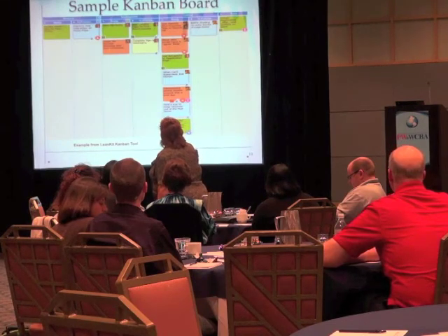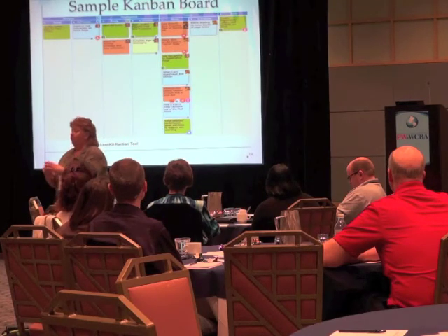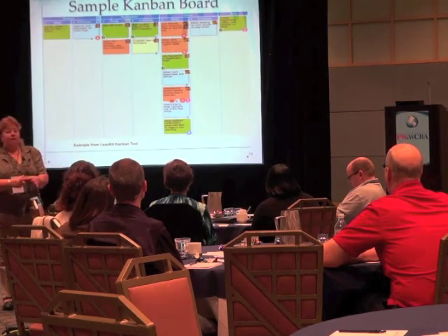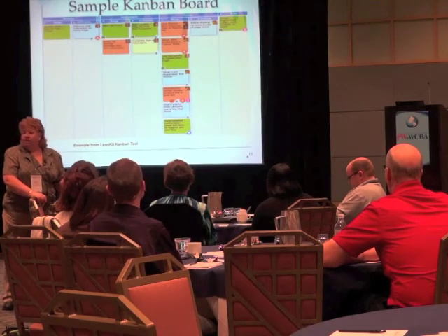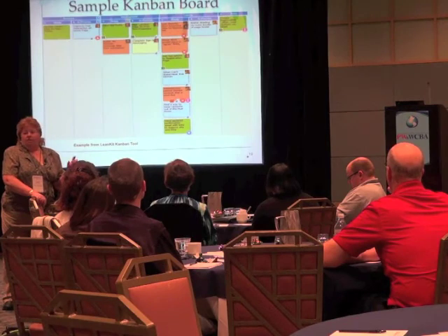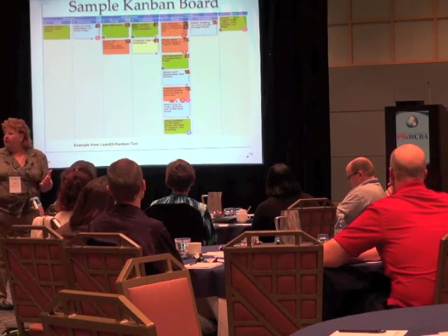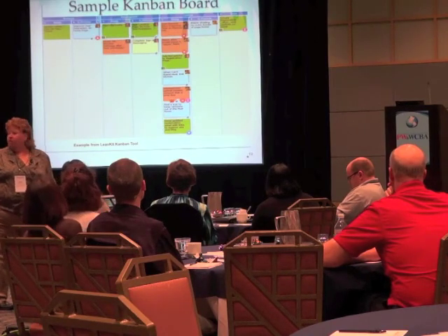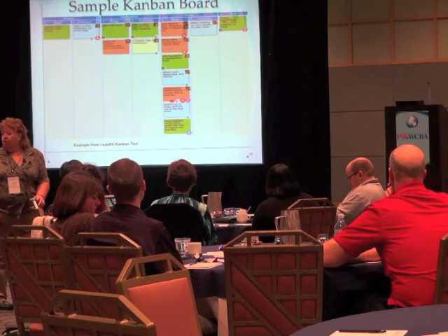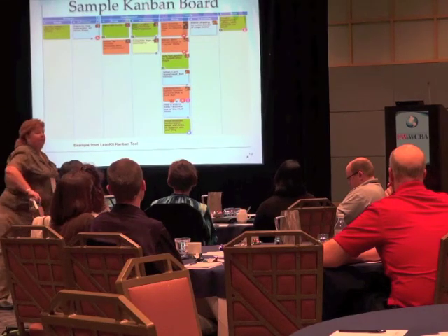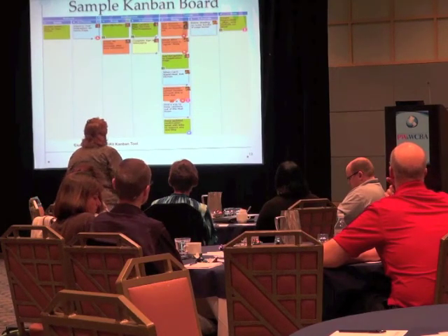And it's all color-coded. So you can color code by class of service. And when I say this, because you can do this with cards, right? You can do this with paper. You can have a visual signal that knows that if it's pink, we need to do it now, right? Versus if it's green, when we get to it is okay. And whatever color scheme you use, doesn't matter. Do what works in your group. Ask people, say, hey, what scheme would talk to you, right? The other thing, though, is once you develop a scheme, post it next to the board so that all the people that come and look at your work can also understand what legend you're using.